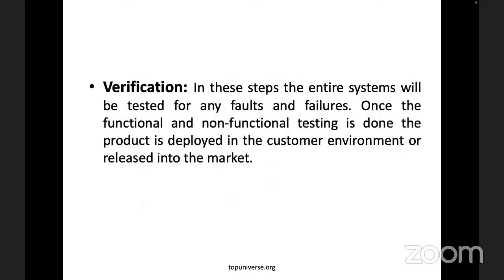So let's move on to the other one, the verification or the testing. Okay. Now, in this step, the entire system will be tested for any faults and failures. Once the functional and non-functional testing is done, the product is deployed in the customer environment or released to the market. Before a product can be released to customers, testing needs to be done to ensure that the product has no errors and all of the requirements have been completed, ensuring a good user experience with the software.